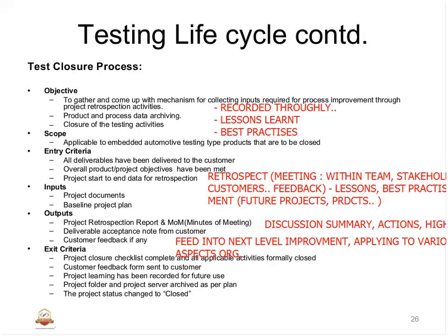Customer feedback form, we should send it to the customer. Project learning has been recorded. Project folder and project server archived. As I said in the earlier step, it's an objective. The project status changed to closed.